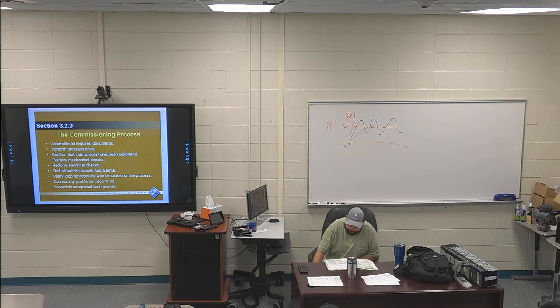Page 17. On that paragraph that started on page 16, about right in the middle, I've got 3 questions that come from these 2 sentences. Tests are typically done in stages where the loop is first operated in manual mode, and then increasing degrees of automation are added.